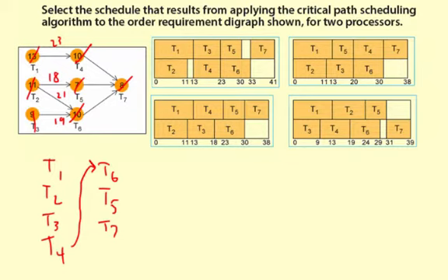And that's fine because task 4 follows task 1, and task 3 doesn't have anything that needs to finish before it, so that's fine. Task 5 and 6 start after 3 and 4 are done, and task 6 needs to follow task 3, so that's good, and 4 only depends on 1, which was completed a long time ago. And then task 5 is assigned, and then task 6. Well, this follows the digraph, but it doesn't follow the priority list down here because task 6 should have started first, and then task 5. So this one does not follow the priority list.